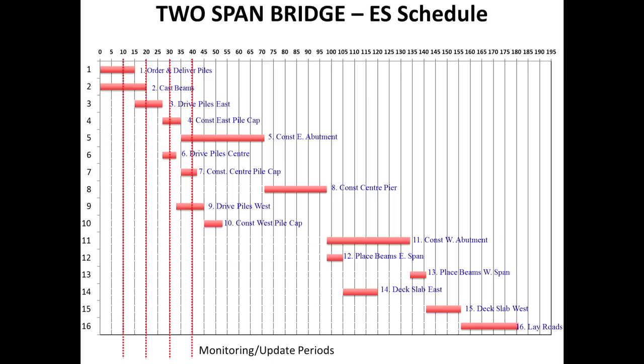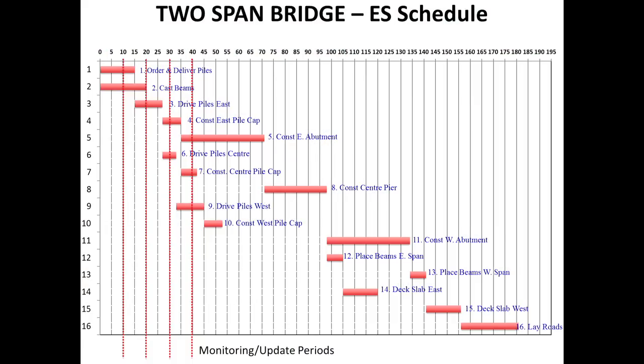On the other hand, if I try to update it on a daily basis, the overhead of getting the data — I would have to have meetings, two meetings a week — there will be more meetings than work getting done. So, I have selected an update every 10 days, which seems reasonable for a project of this kind. People who are extremely familiar with the project might even take it every 20 days or once a month if it is a very standard kind of project.